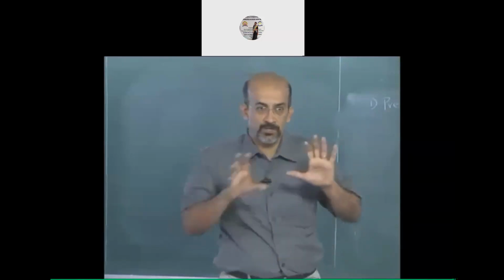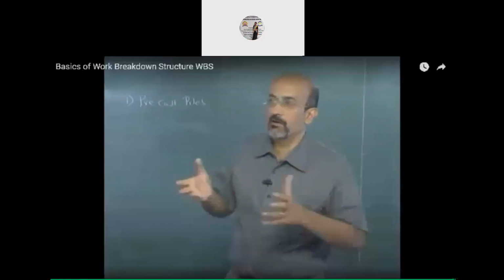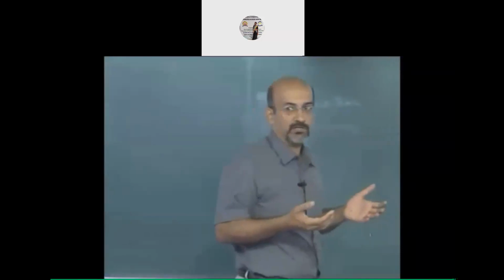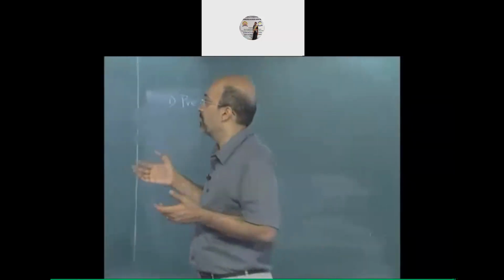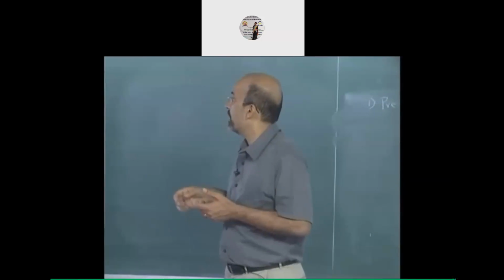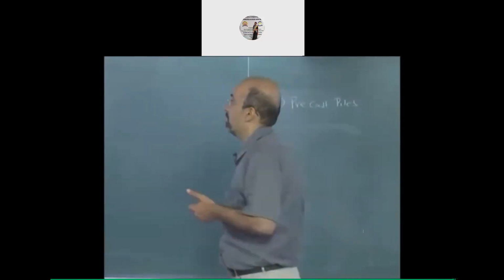When we talked about project management being a part of it, this is something that used to be missed. People wouldn't put project management in the WBS because it was not a component or something like that. No drawings were coming out of project management. There were plans, but it's not a component. But there's a lot of money spent on project management, and there are resources on project management. So we should make sure that all parts of the job are taken care of when we do this WBS. And when we decompose a WBS, at each level, 100% of the work applicable to the next higher level is met.